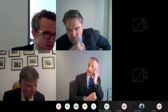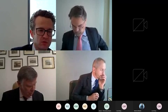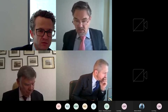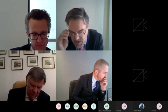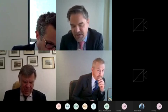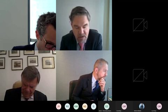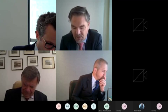But if you're going to have subterranean parking, as you have anticipated, aren't you going to need a 5th floor? Potentially, but until I've done the design, I don't know. All right. And this is the whole point in terms of the life cycle of development. Until you get to that stage, you can't be that accurate.